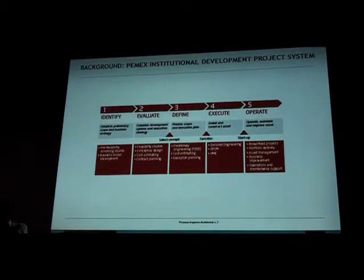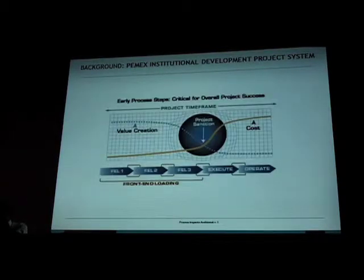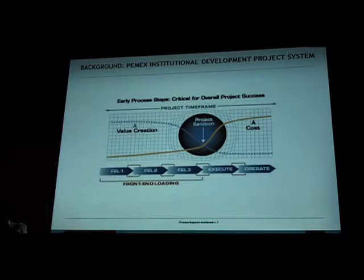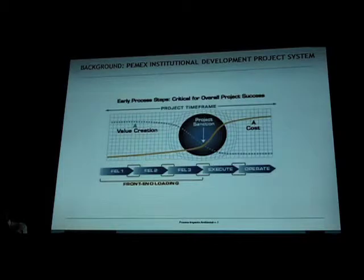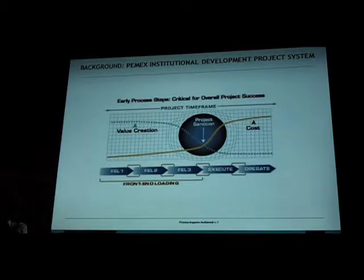The front-end loading process has different gates and triggering points for making a decision, continuing with the project, and improving upon it. The opportunities for value creation are at FEL one to FEL three — up front in the face of that project. That is where you can create the most value, and if there are any changes to a project, they will have the least amount of cost involved. Once the project is sanctioned, your opportunity for value creation will decrease, and any changes made to the project will have dramatically higher cost.